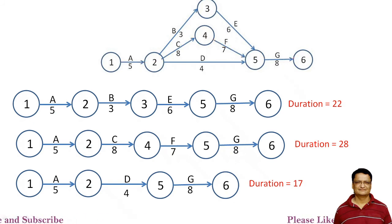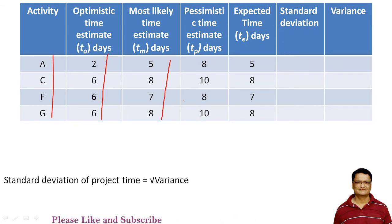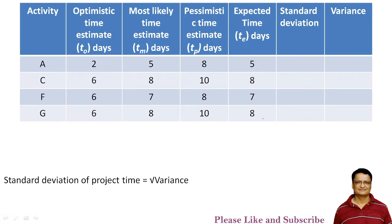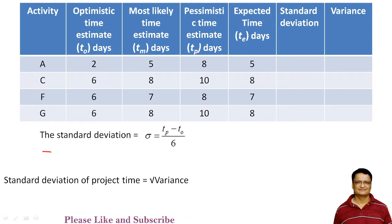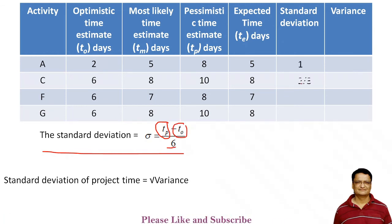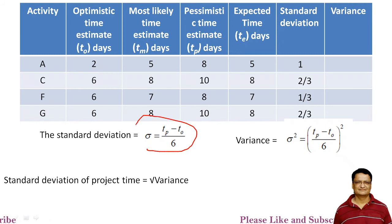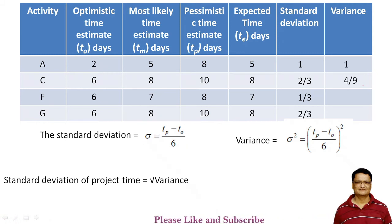For further computations, we consider only critical path activities A, C, F, and G. For each of these activities, we compute the standard deviation using the formula: σ = (T_p − T_o) / 6. The variance is the square of the standard deviation, giving us the variance values for each critical activity.